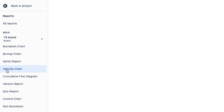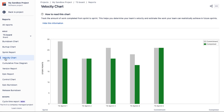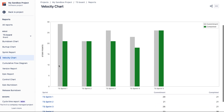So assuming you've run a few sprints, you can use JIRA's velocity chart to calculate velocity. If you haven't seen it before, you can go over to Reports here on the left. When you click on that, you'll notice that the velocity chart is an option. Clicking on the velocity chart, you'll notice it shows you a couple of values per sprint. The first value, indicated by the gray bar here, is the committed number of points — the amount of work the team thought they could achieve in that sprint. The second value is the actual number of points the team achieved — the completed number of story points — shown by the green bar.